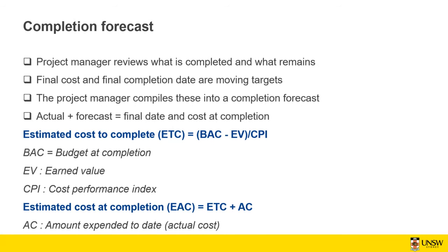So you planned it to cost 30K, and that was the actual cost, but somehow the end value is 40K. So yes, you plan it, for example, after 6 months, this work needs to be finished, and you planned for 30K for this work to be done. But when 6 months pass, only 2/3 of the work is done. So it means that only 20K of the work is done, which is your earned value. But if your actual cost is 40K, it means that you're even 20K higher than the earned value. So your cost variance is going to be minus 20.